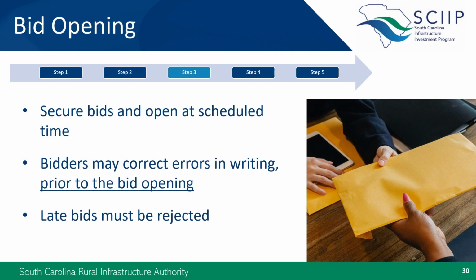All received bids should be kept secure and unopened until the scheduled public bid opening. If a bidder wishes to correct an error, they may do so in writing prior to opening. Any late bids should be rejected and returned unopened to the bidder.